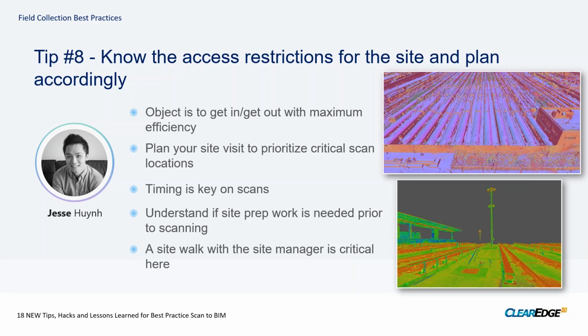And then the last thing, it kind of touches base on the previous tip, which is talking to the site managers, getting a preliminary site walk. Don't expect to be on the site just once on one day and have it be a done deal. Oftentimes it may be multiple instances.